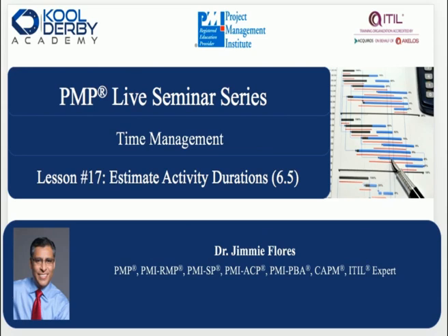We have estimated activity resources, but now that we know the resource, we can determine the duration because the skill level of the resource or the type of resource affects the duration. Remember that resources are not just people. It could be equipment, technology, and anything else that we use as a resource. A resource is anyone or anything that is allocated to the project to get things done.